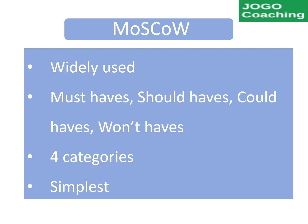MoSCoW is one of the widely used prioritization techniques in agile projects. MoSCoW stands for must-haves, should-haves, could-haves, and won't-haves. Any of these four categories will be assigned to each user story in the backlog. Must-haves will be taken as the top priority for the development. This is the simplest approach for user story prioritization.